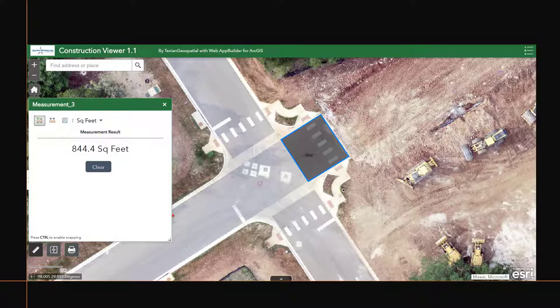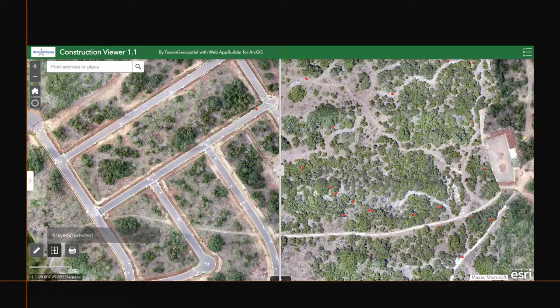Can you talk about the orthomosaic imagery and in what ways you guys are utilizing that information? We do weekly flyovers. It gives us angled shots and then straight up and down imagery that lets us analyze what's going on the ground from that perspective. But we also have our group put together a mosaic for our property on a monthly basis. We use that information and feed that to our civil engineers, and that helps us when we're land planning and our civil engineers are designing the next phases that we need to develop.